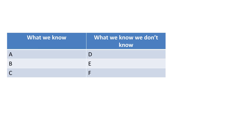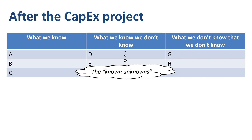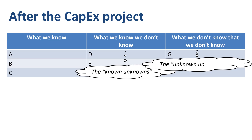After implementing the CAPEX project, you should have a lot more information than before it. You can update the first two categories and provide input into the third, which is called 'What we don't know that we don't know,' also known as the unknown unknowns.